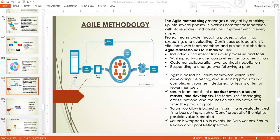Scrum is wrapped up in events: the Daily Scrum, Sprint Review, Sprint Retrospective, and Sprint Planning. All these events are things you need to observe within Scrum. The Daily Scrum is a daily standup — every day you spend 15 minutes within the development team to collaborate. Without this, you find that some days even weeks might pass with people not talking to each other, but this gives you the opportunity to talk at least every day.